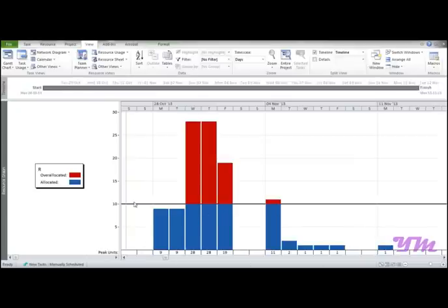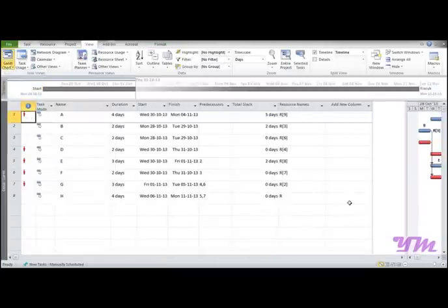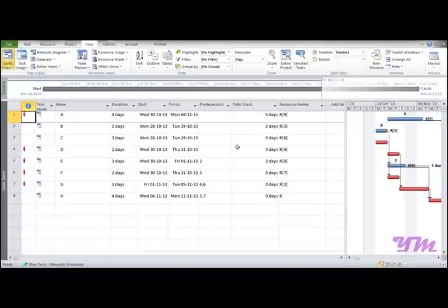So a manager would efficiently redistribute these tasks without affecting the duration of the project, and that can be easily done with the resource leveling feature. So let's see how we can do it. Let's get back to the detail Gantt chart over here. Now you can see that we have Slack available for some of these days for A, B and E. So delaying the prior activity would not affect the overall project cycle or project time. So one way to settle this issue is by using the Slack.